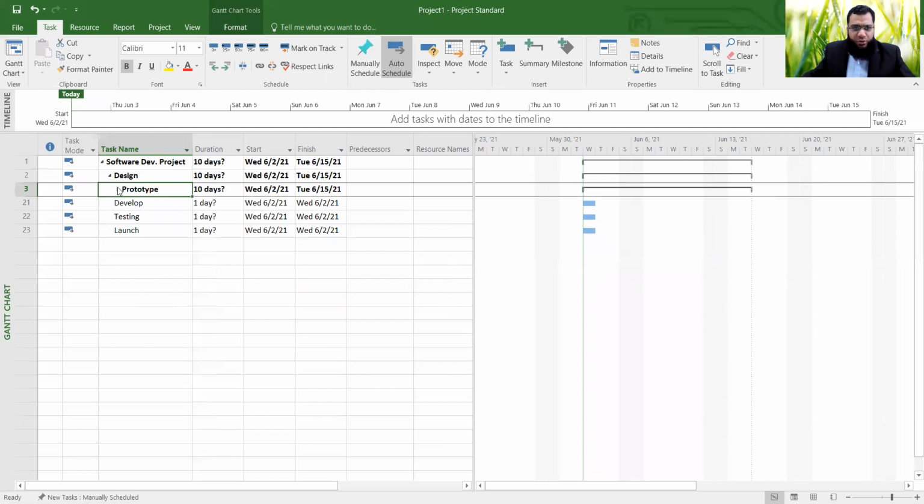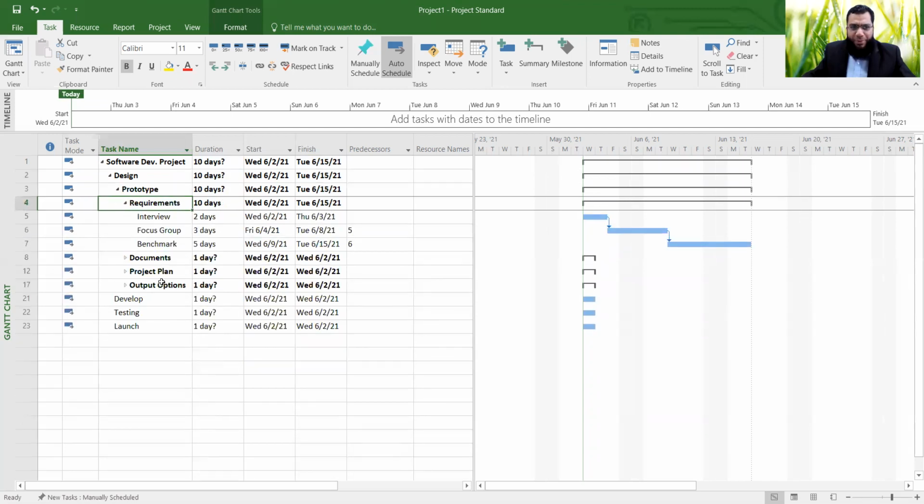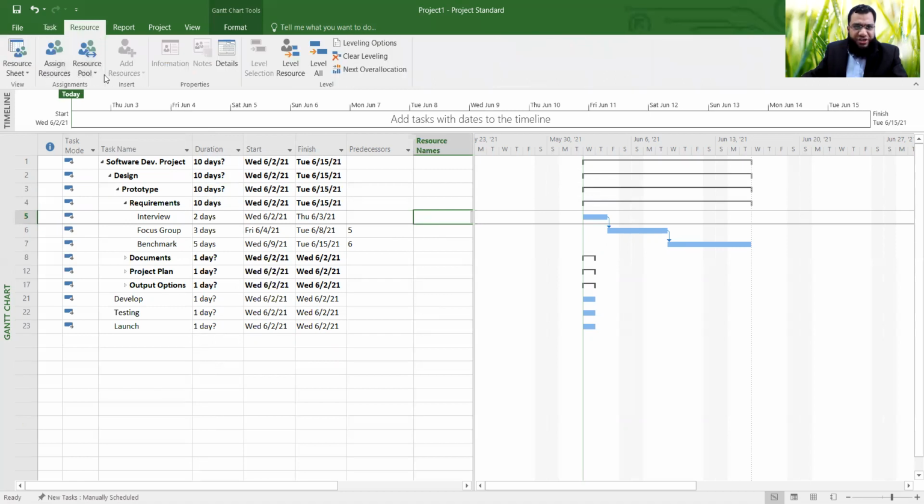Now, I will go ahead and work on one of the work packages in more detail. For example, we have interview. So you can see that now we define the relationship. And of course, we can add resources. You may also add resources from the resource column. You can also assign resources and also assign the amount or the cost of each resource. It could be $100 per hour, and the resource is 100% for the project or 50% for the project. Remember, if it's a matrix organization, some resources are not available 100%, maybe available half of the time.